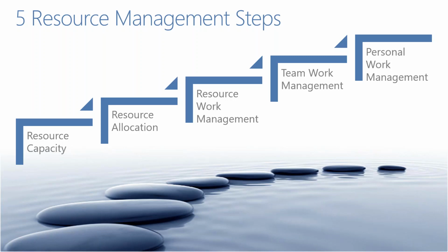The next step is really about resource allocation, basically taking those high-level capacity plans and then specifically looking at getting specific resources allocated to specific pieces of work within that, and the specific named individuals being tagged with those roles, and being able to manage that on an ongoing basis.